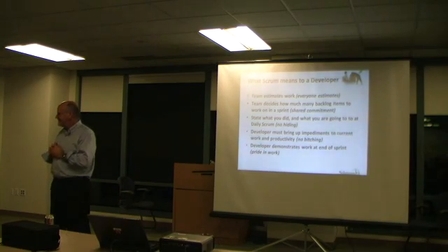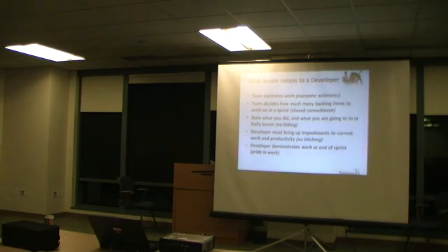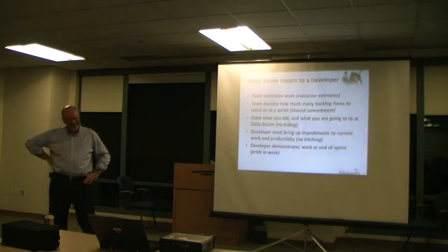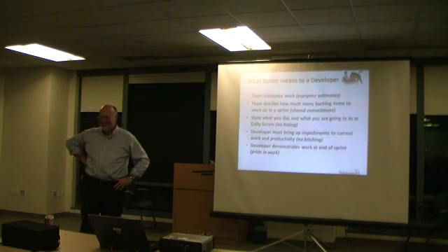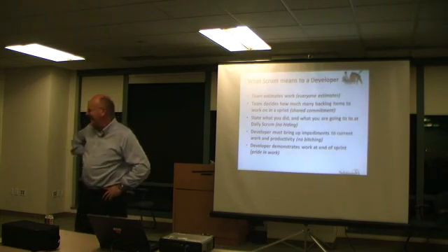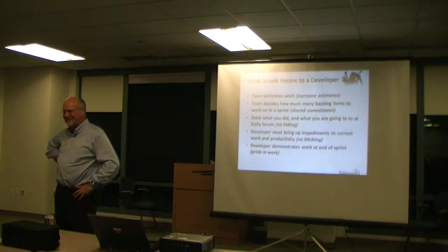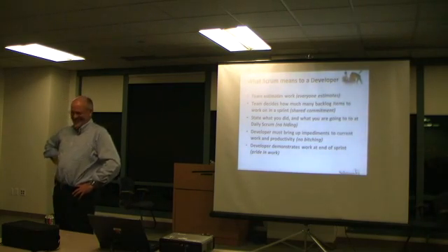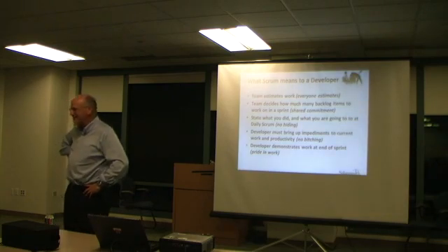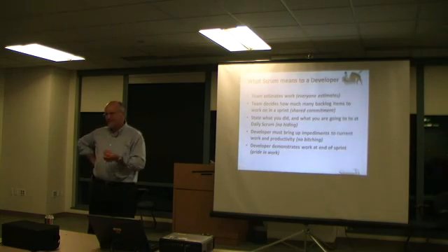Now the other thing is keep the managers out of the damn stand-up meetings, because nothing is worse than having the manager standing there. Then everybody feels compelled to do a five-minute dissertation on everything they did the day before, so they don't look like they're slacking. If the manager's not there, a lot of people just say, I worked with him, and that's the end of their report. But if the manager's there, it's, well, I did this, and on and on. That's a great point. In fact, I'm going to take that advice. So if your managers were there, that might have been working because they're dragging your meetings.